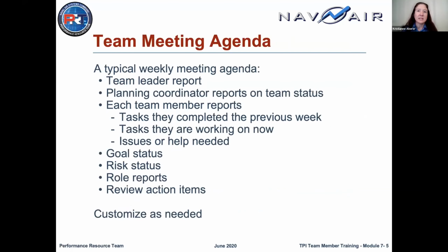Right, so the agenda, the team leader will report on any senior management communications, facility issues, things like that. Then the planning coordinator will report on how well the team's been logging their time, the accumulated earned value, how many tasks are in progress, and how the schedule looks, whether you're going to finish on time or not. Then team members will give their status on what they've been working on last week, what's coming up this week, and any problems that they have or help that's needed.